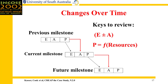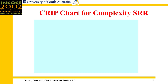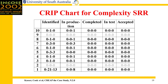The chart is used to compare changes over time, so you need to look at it over a series of milestone reviews. The planned from a previous milestone becomes the estimated for this milestone; the work done becomes the actual. By looking at this, you can take a look at the planned and see if the resources committed to implementing it are reasonable. Here's the CRIP chart for the complexity category at SRR.